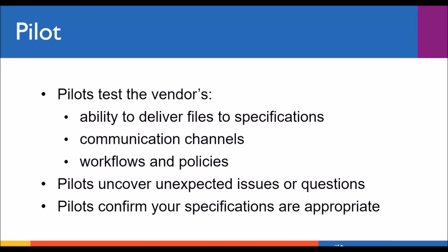So when you do a pilot, not only are you testing the vendor's ability to deliver files according to your specifications, but also the overall experience of working with that vendor. How's their communication? How's their reporting? Did they find anything unexpected that's going to affect the full project? Were the files delivered according to your specifications? Can you use the files you received? You can also use the pilot to receive several different deliverables and narrow down your selection to what you actually want for the full project.